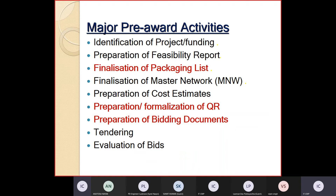Then preparation and formulation of QR - there are two types of QR. One is the QR of the company, the agency, the bidder. What is the qualifying requirement? You are engaging a party and they qualify some criteria - normally two criteria: one is technical criteria and another is financial criteria. Then we go to bidding, and for bidding you have to have documents: one is the technical specification, another is the conditions of contract. The technical document will have proposal sheets to quote the financial figure. Then tendering is done and finally the evaluation.